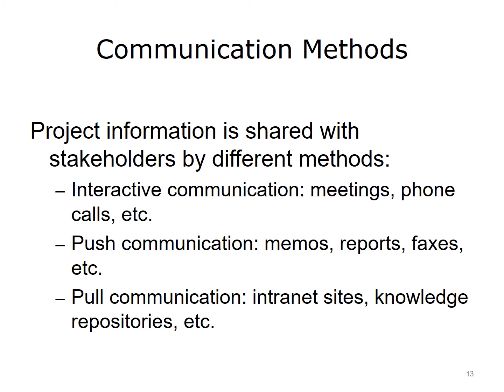Pull communication relies on the information consumer to actively pursue the information they need. This is a popular and effective tool for many geographically distributed project teams who may not be able to effectively interact in real time. Tools for pull communications include Internet sites, wikis, knowledge bases, and web-based project management tools such as Basecamp and Jira. In large and small healthcare organizations, multiple, frequent communications are best.